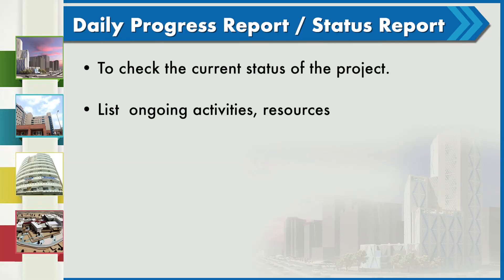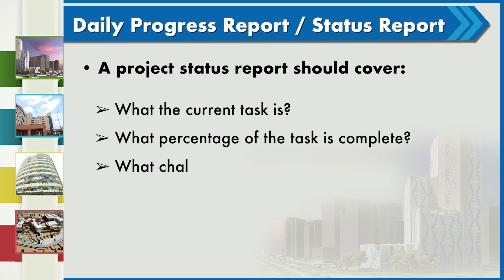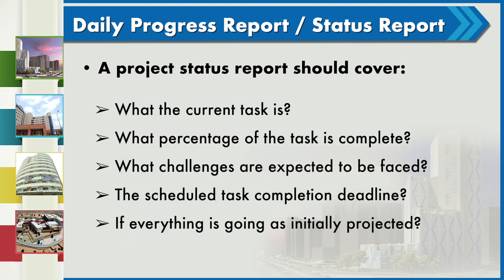The daily progress report or status report is used to check the current status of the project, including the list of ongoing activities, resources mobilized, labor occupied, challenges incurred, and other details for current executions. The project status report should also cover the current task, percentage of task completed, expected challenges, scheduled task completion deadline, and whether the projected plan is on timeline.